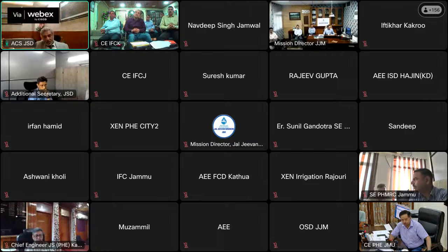So JJM particularly will take note of this, and the 2 chief engineers will take note of this. They will specifically, once they inventorize within a period of 7 days, by 10th of September, they will exactly know which of the material which is in perfectly usable condition is lying in any of the stores which can be put to use anywhere. And they will then indicate that we will debit it from this particular thing, credit it in this scheme and use it. Is it clear?